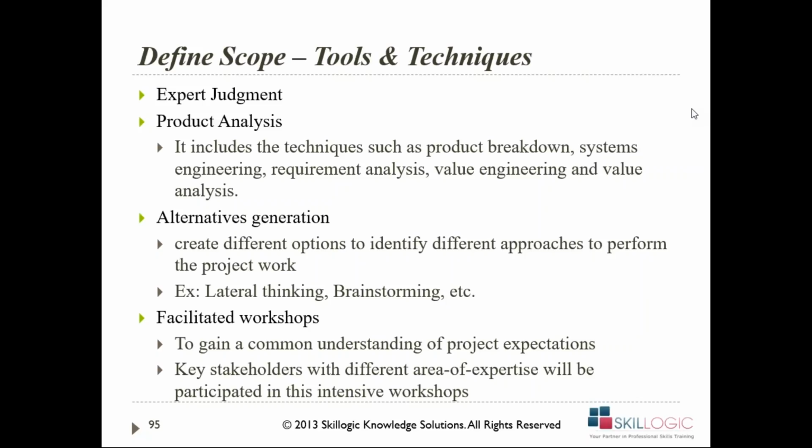Now, a work package can be further divided to an activity level. For example, in the video that you have seen, the microwave was the last work package. Who's going to order the microwave? Who's going to get the microwave? Transit of the microwave, installation of the microwave. All those are tasks which have to be accomplished to get it in place wherever it is supposed to be. We have not divided the work package to the task level. The last level of the work breakdown structure is the work package.